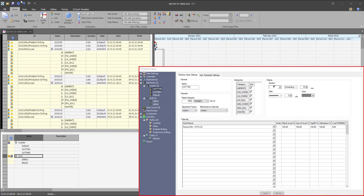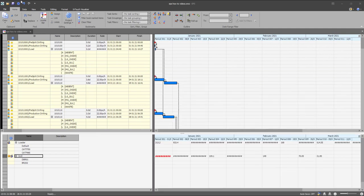The machine types such as the loader, the drill, are mapped as summary resources and used as a generic resource that can be replaced by any of the specific resources.